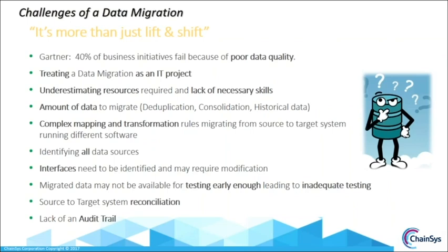Migrated data in a system conversion frequently is not available early enough in testing, and that could lead to inadequate testing. It's absolutely essential when you're doing a data migration as part of a system conversion that you have complete data available as early on in the project as possible.